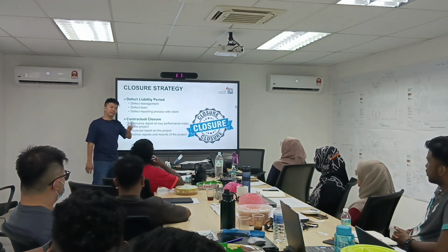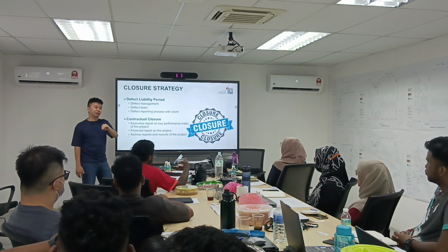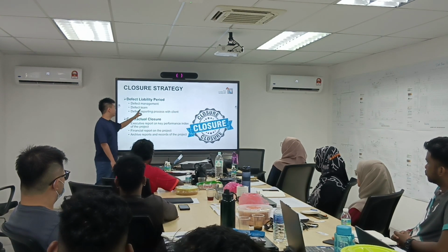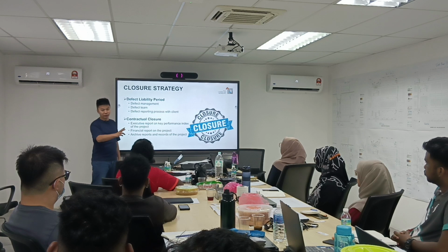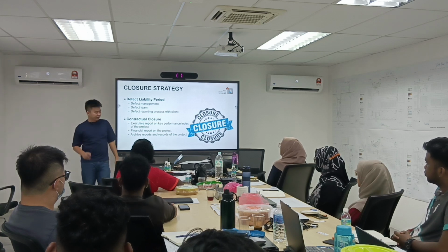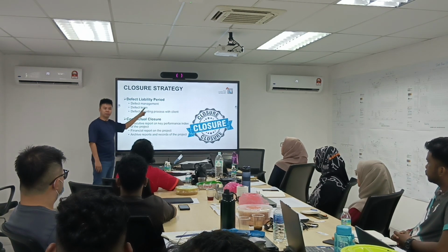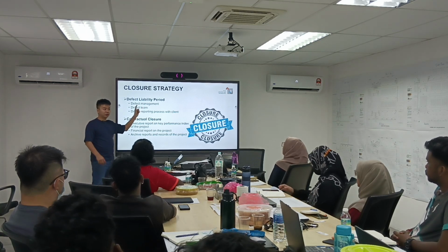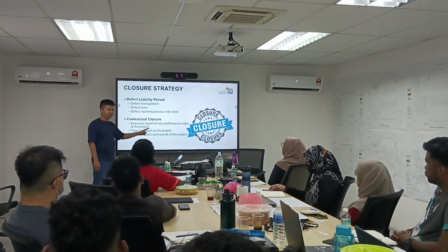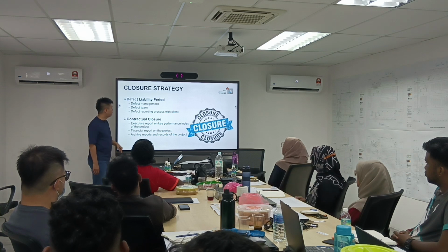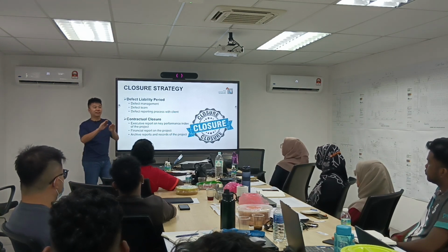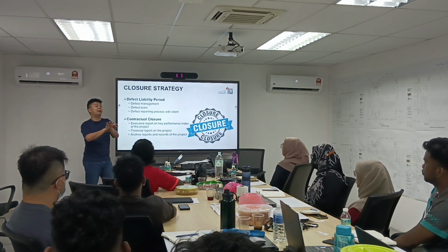Okay, so normally the defect team won't be a lot of people. It's just a few people, 1-2 engineers. But again, these defect team people and the T&C engineer are the same category. These are the fastest learning group. They will know every single thing in the project because all their job is to settle problems. Okay, so in terms of defect management, now what I see in JDC day one is damn messy.